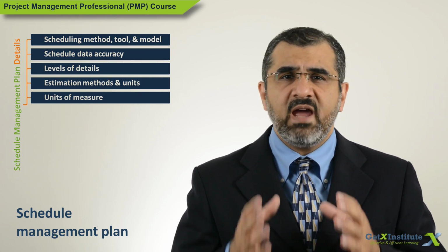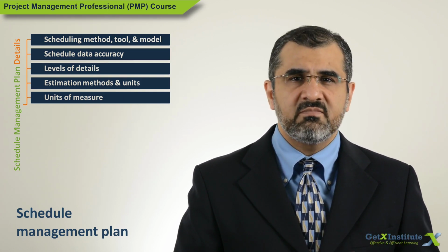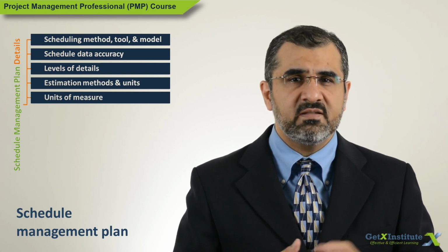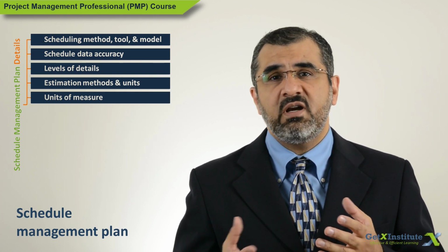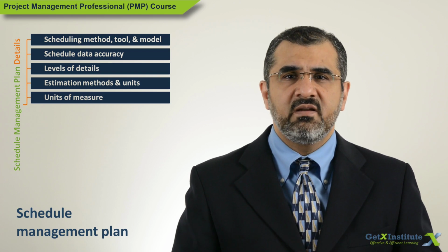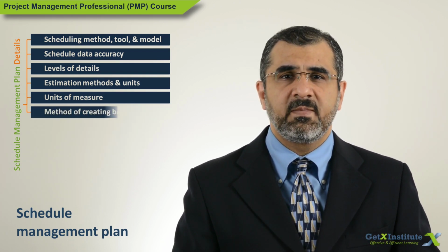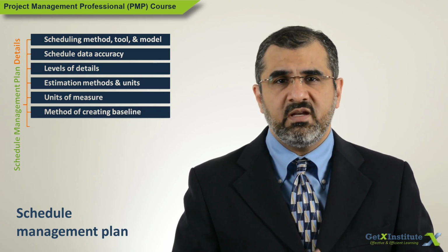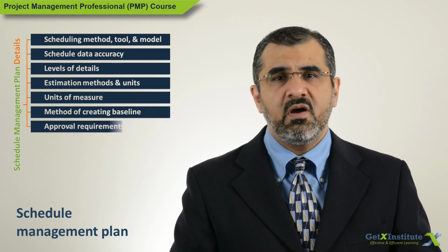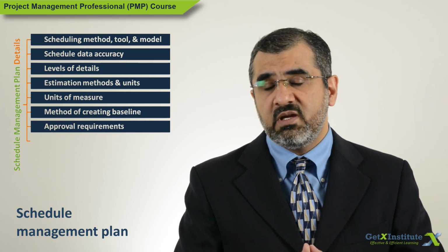How the resource effort is to be measured: in dollars, effort hours, effort days. Similarly for distances, weight, and other measures, the unit of measure will be decided. How the baseline will be created, who will approve it, how often the schedule will be reviewed.